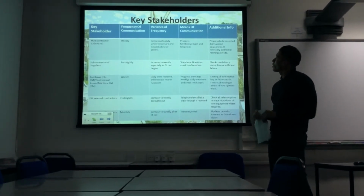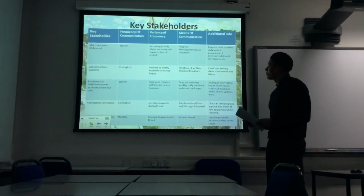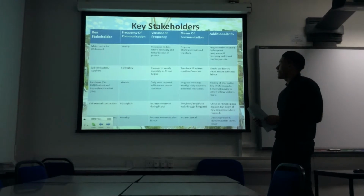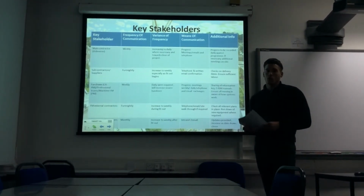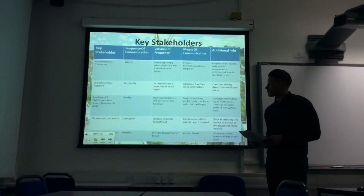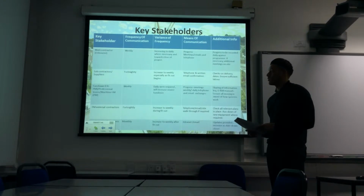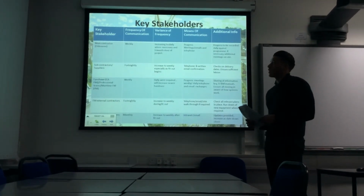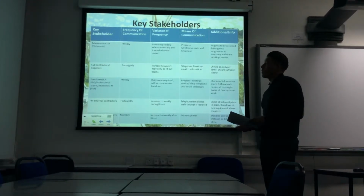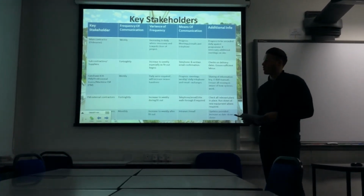In the additional info column, we have progress will be recorded against the programme daily, so we can be warned of any delays, and then if necessary, additional meetings on site, walk-arounds, to go through anything and look at the progress up front. Next in that key stakeholder column is the subcontractors and suppliers. These will be dealt directly mainly and be under the control of Osborne, but we still need some communication with them from the FM side, especially with the suppliers.